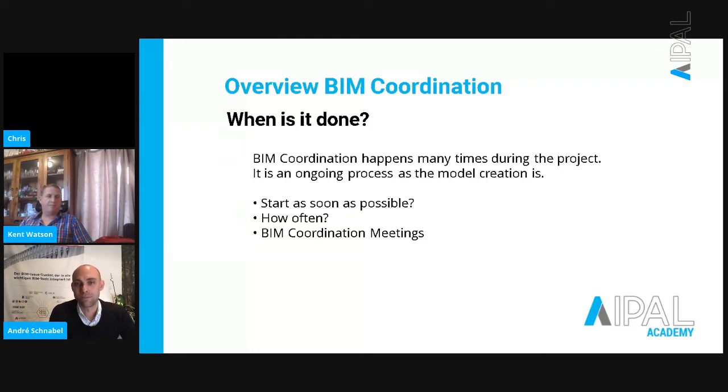Yeah. So to answer your question, when is it done? As often going down into pre-checks, but also coordination meetings weekly or bi-weekly or monthly. Yes. So I think most of the projects I'm in contact with are doing that. I think fortnightly is something that I see most often. Okay. But let's go on to the next slide.